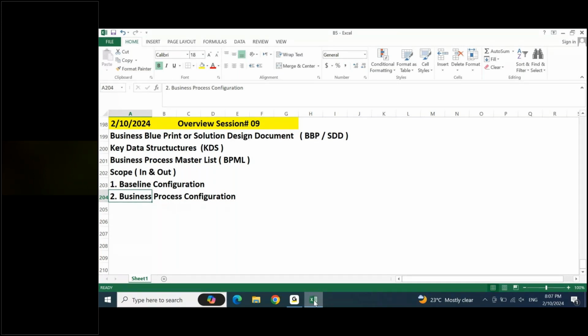Now, if you are giving me an additional requirement later on, because of this additional requirement, I may not be able to complete the project in the month of November, because this additional requirement may require me to take additional 15 days of time, additional one month, and forget about the time, this will require additional effort. For the additional effort, there will be additional charges.